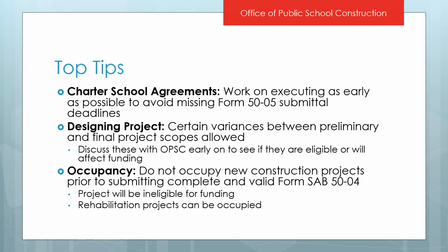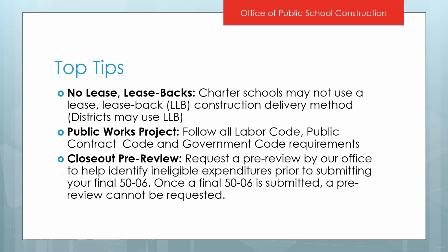Don't forget that certain variances are allowed between your preliminary project scope and your final project scope. You should discuss these with us early, so that we can help you determine if they are eligible or if they might affect your funding. Remember, do not occupy new construction projects prior to submitting that Form SAB 5004. Otherwise, you'll be ineligible for funding, and that does not apply to rehabilitation projects.